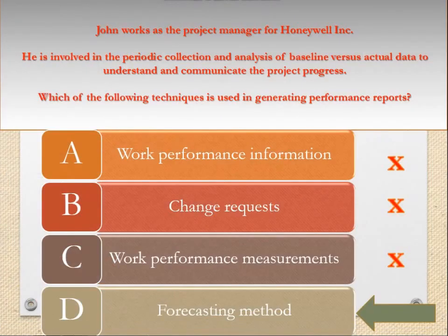Answer option B is incorrect. Change requests are requests to expand or reduce the project scope, modify policies, processes, plans, or procedures, modify costs or budgets, or revise schedules. These requests for a change can be direct or indirect, externally or internally initiated, and legally or contractually imposed or optional. A project manager needs to ensure that only formally documented requested changes are processed and only approved change requests are implemented. It is an output of the report performance process.